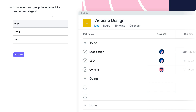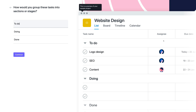Here, what we want to do is add our tasks into sections or stages. This is a great way to manage all our tasks so it's streamlined and easy for our team to understand. For now, I'm just going to leave it as 'To Do,' 'Doing,' and 'Done.' We've got these three tasks under 'To Do' which need to be completed. As our team starts working on each task, we can move them to 'Doing' and then 'Done.' Come down here once you're happy and click continue — you can change these later.